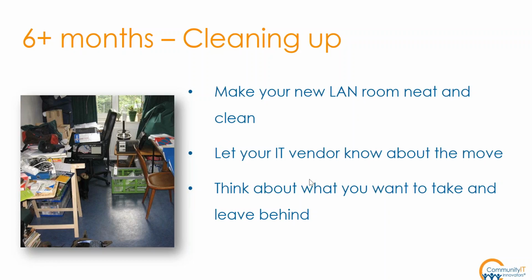One of the things we recommend is to have your IT vendor know about your move well in advance. Again, we're saying 6 months out. Think about any projects that you might be able to do to clean up old servers, virtualize servers onto new hardware, and move services to the cloud. Generally, get any of the old stuff out and do any projects you can. This is a good time to have an audit done just to see where you are and if any of these things can happen in a reasonable time frame before you get started with the office move.